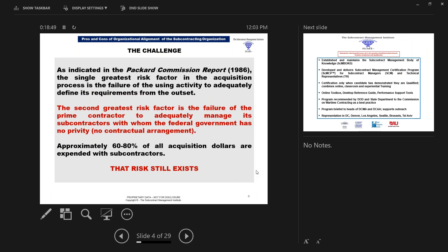Let's talk about the challenge. The Packer Commission Report of 1986 clearly defined the challenges that we have. The single greatest risk factor in the acquisition process is the failure of the using activity to adequately define its requirement from the outset. We all have experienced ambiguous requirements. The second greatest risk factor is the failure of the prime contractor to adequately manage its subcontractors from the outset. Remember, the federal government does not have a contract with these subcontractors — there is no privity. Approximately 60 to 80 percent of all acquisition dollars are expended with subcontractors.